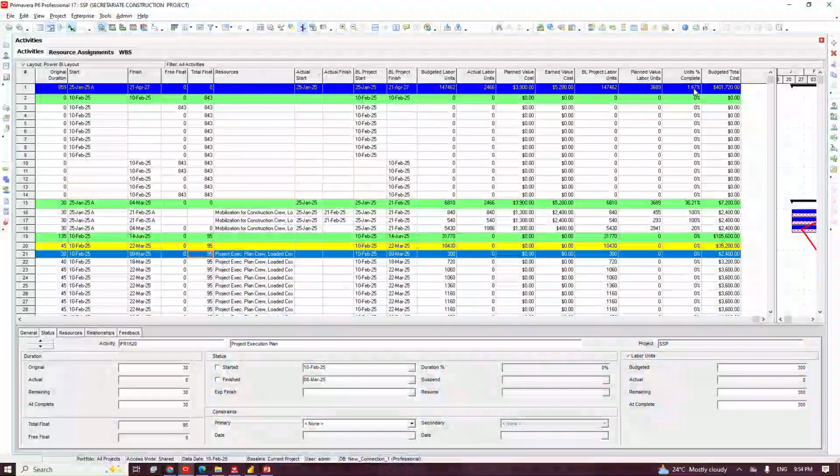If you see your unit percentage complete, can you see it here? So remember I told you that we track the project with three things. We track with unit percentage complete, with schedule percent complete, and with performance percent complete. But the unit percentage complete is what we report as our earned value, while we use the schedule and performance to know whether we are ahead of schedule or we are doing well with our performance. That's exactly what we have here now.